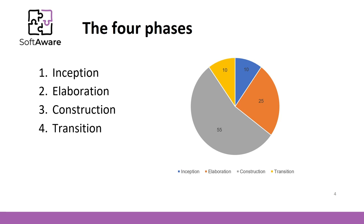Now let's look at the proportions of each phase. Around 10% of project time is dedicated to the inception phase, around 25% to the elaboration phase, the biggest construction phase takes around 55% of the project time, and finally the transition phase takes around 10% of the project time.